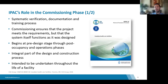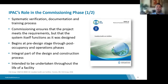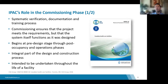This will always involve a walkthrough — go through the space once it's completed and review all IPAC elements: hand hygiene products are placed properly, all finishes are implemented as planned. For larger projects involving HVAC systems, you want contractors and engineers brought in to verify those systems are functioning properly. You yourself viewing the space won't verify those elements, so you should request commissioning reports be provided to you, which demonstrates due diligence without needing engineering expertise.